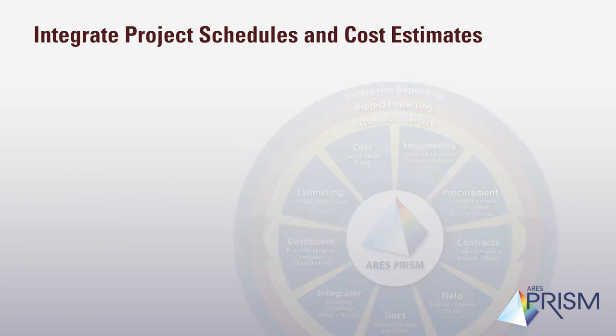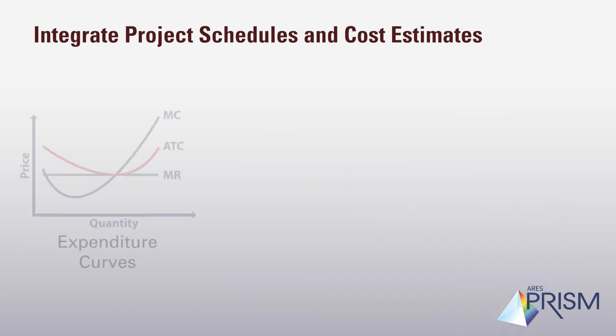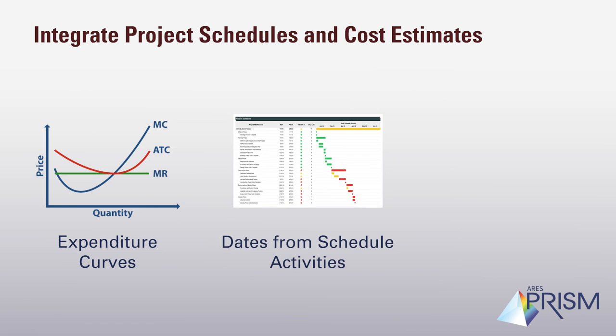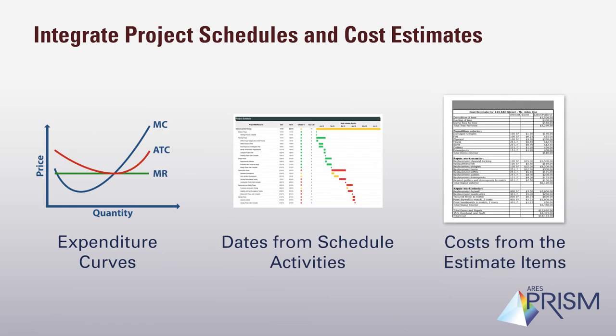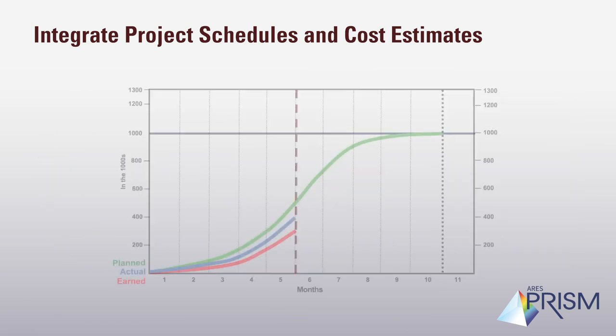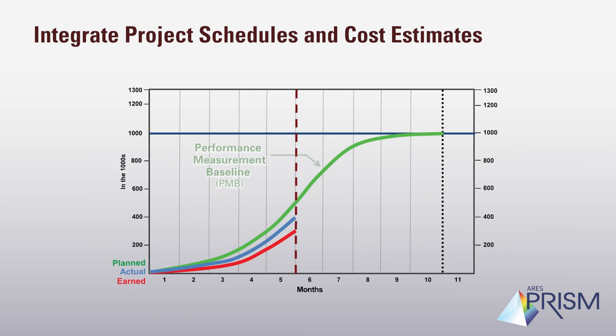Prism Cost uses expenditure curves assigned to a control account, dates from schedule activities, and costs from the estimate items to produce a time-phase budget. This time-phase budget is then saved as the performance measurement baseline, against which progress will be measured.